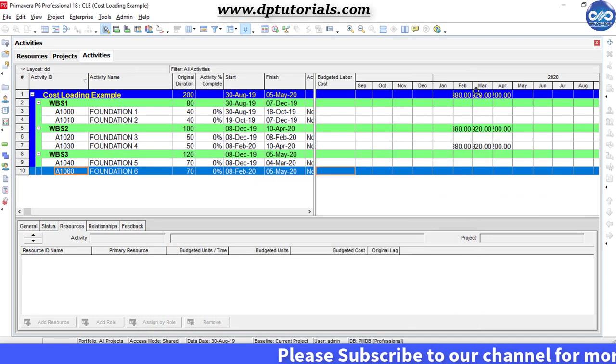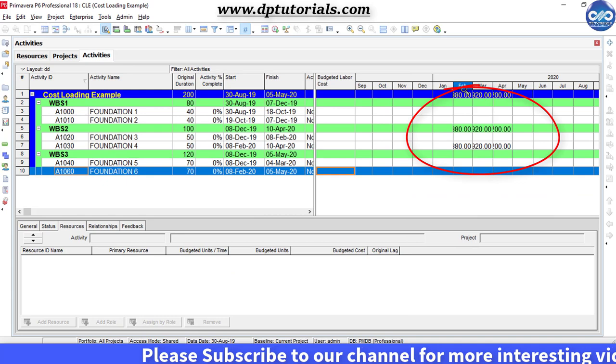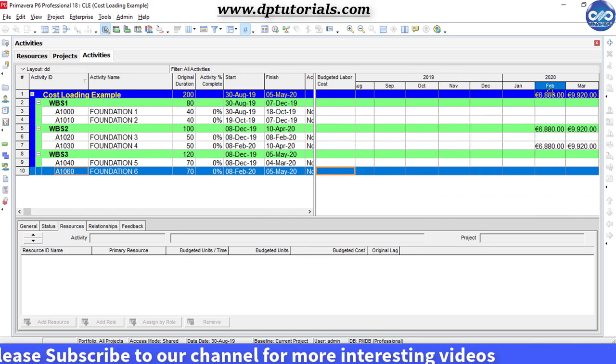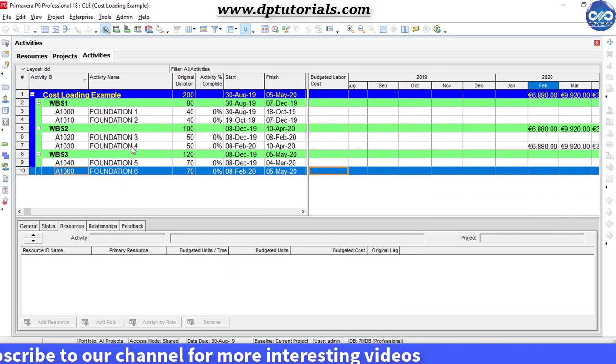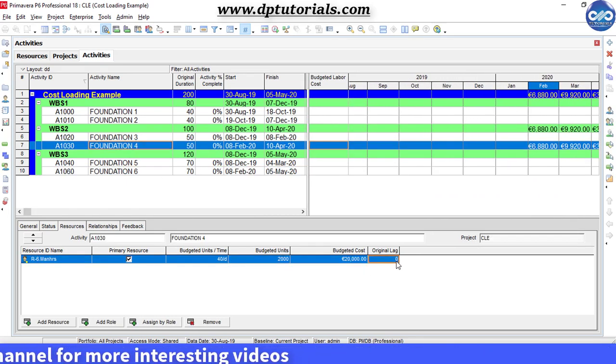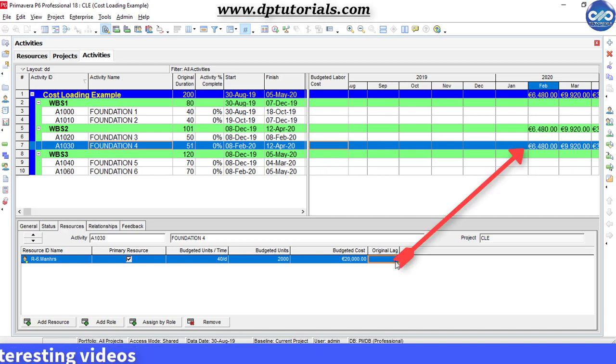You can see the distribution of the cost like this. In the details section, if you insert the original lag, you can notice that the distribution moves accordingly in the timeline.